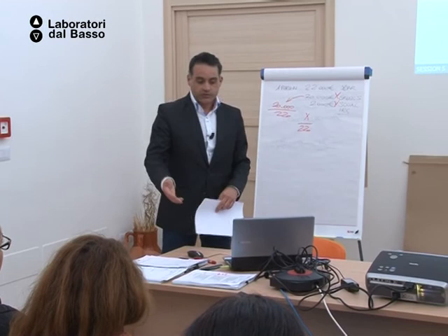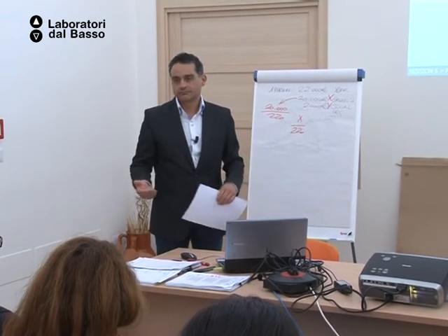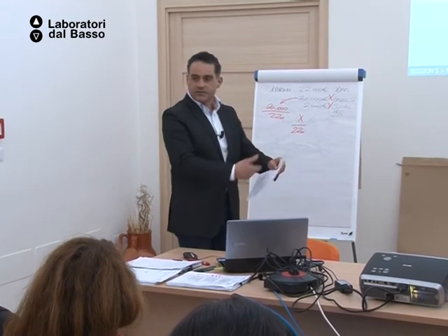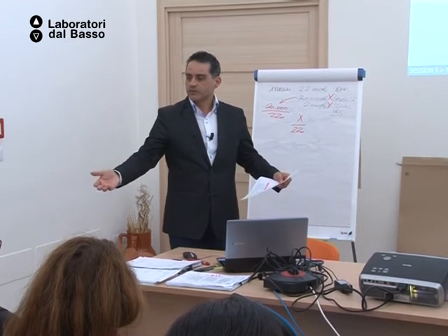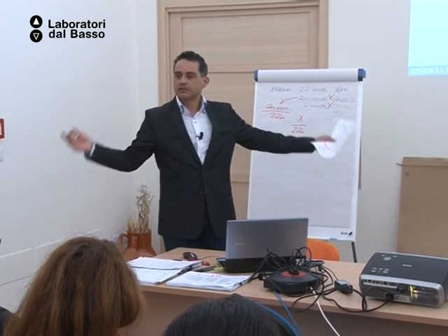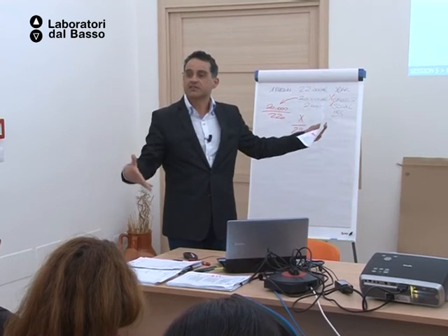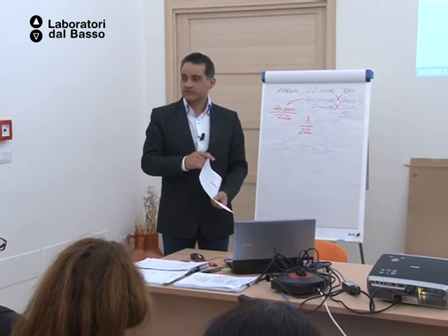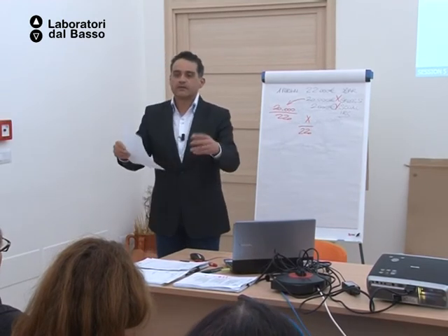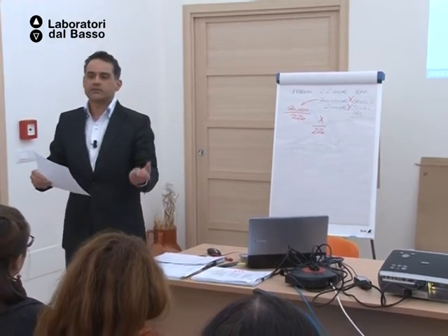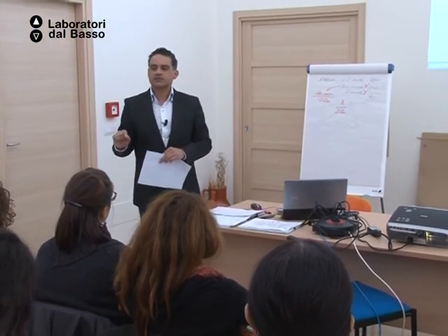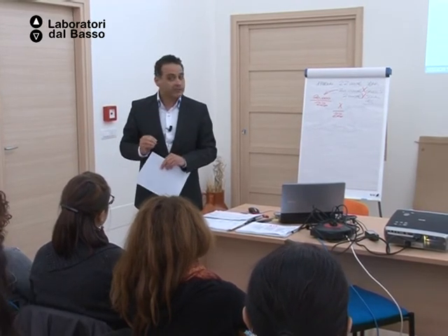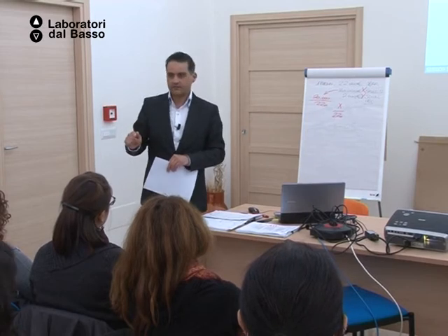Like I said, use real cost, not sellings. Use the salary pay slips, the slips that you use for your workers. Now you can link the situation with the contract and legal. What is staff? Staff is legally connected staff. In Portugal, you are legal if you have what they call green receipts, but only until a certain point of duration, and you understand? Staff, be clear about that. Staff means real staff.